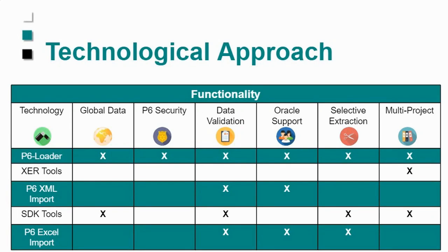You can actually take multiple projects, but as soon as you do, all the features that allow you to edit anything get turned off. Now, right from day one, we've had XER-based tools. So XER is Primavera's standard import-export format, and it's designed to be used to move data from one Primavera system to another.